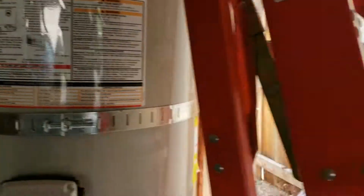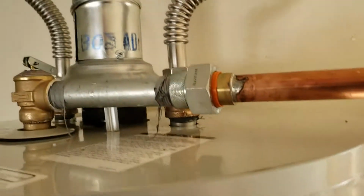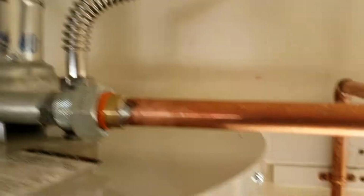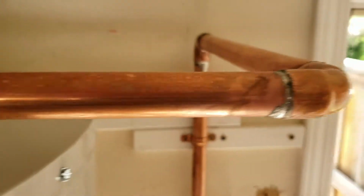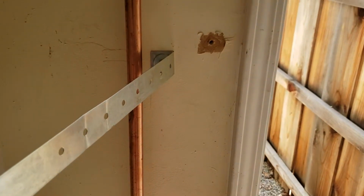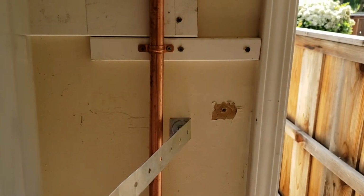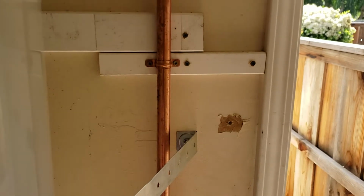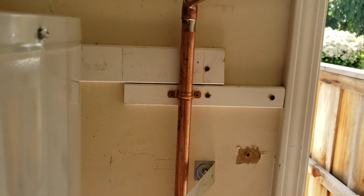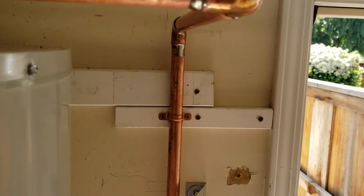We did in our contract have included a permit, and we're going to go ahead and back that out of the contract with a change order. Two things that we're going to add in. One, $100 charge to get this relief line run down the wall and out to the exterior yard, for code so that it could pass inspection. Number 2, we're going to back out $150 for the cost of the permit through the city of Fresno while the homeowner works on some other issues that might affect the inspection. And so we'll get that out later today. So we'll make that adjustment, get a change order out, and take payment accordingly.